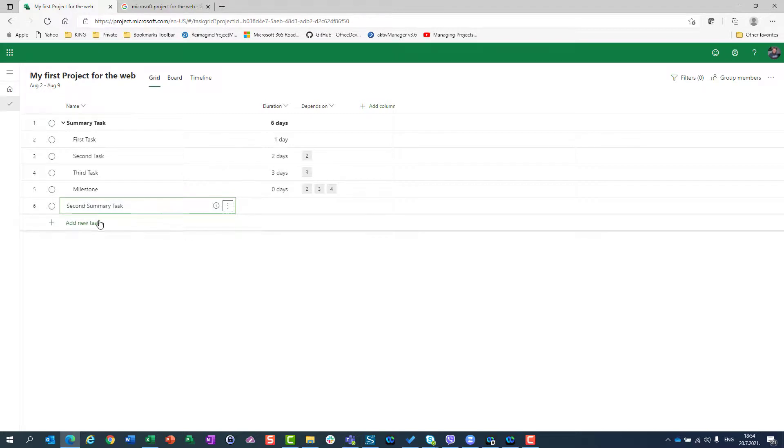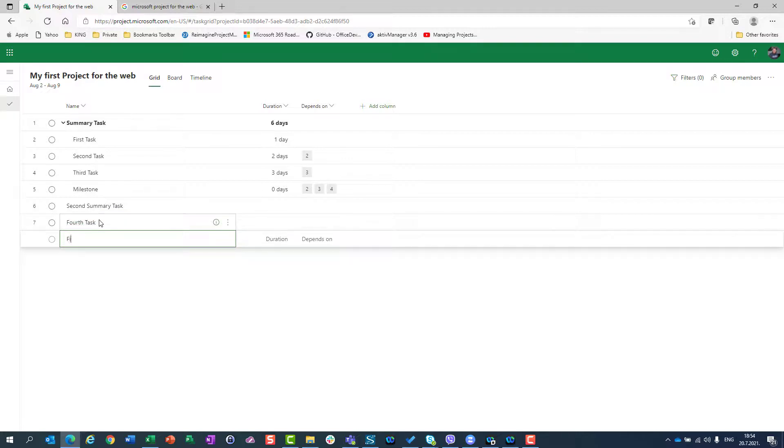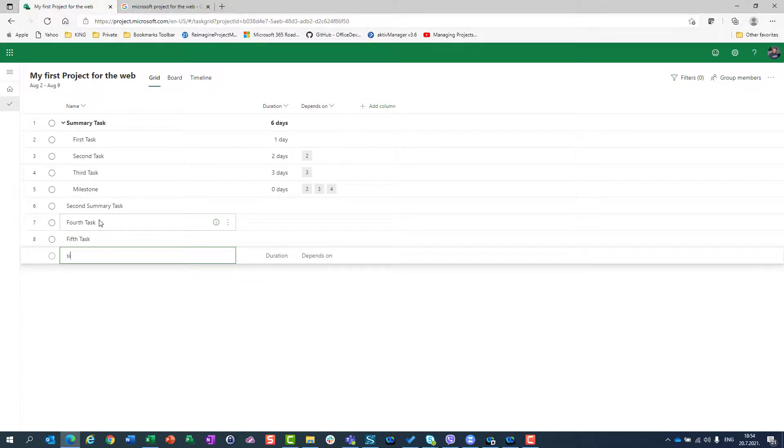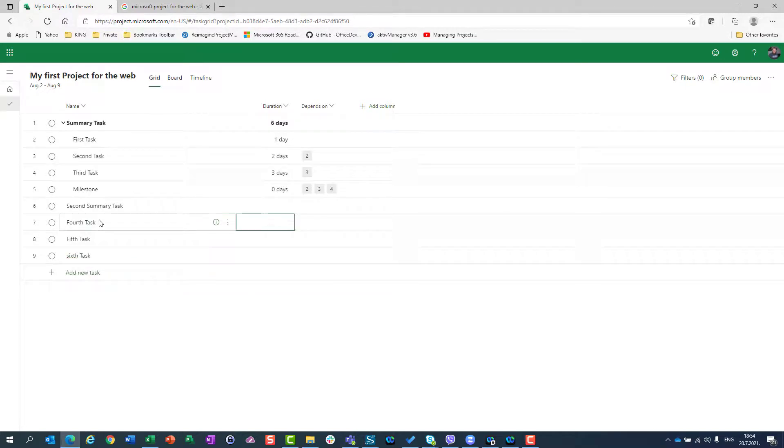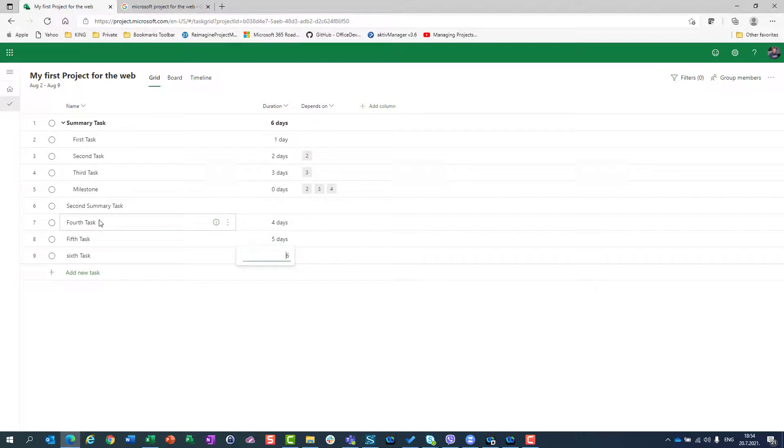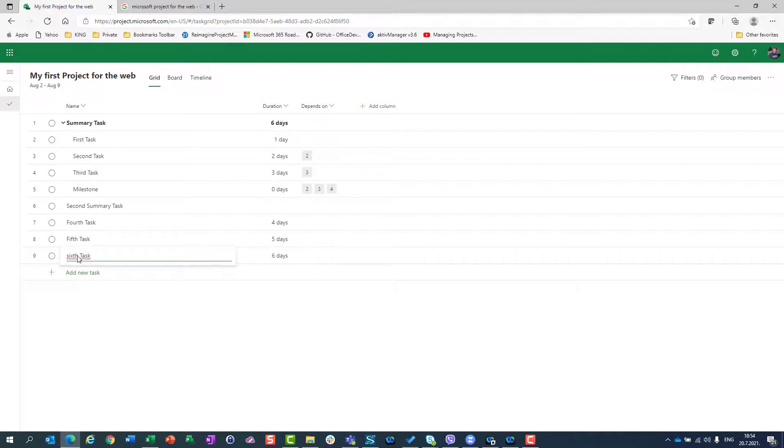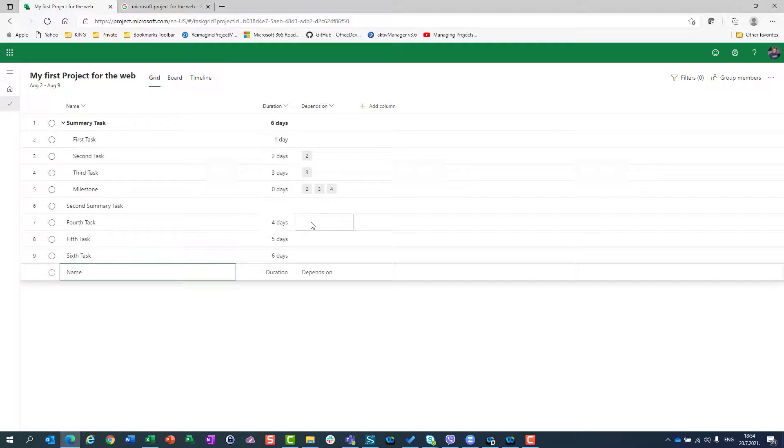So, I have second summary task. Now, I can say that I have fourth task, fifth task, sixth task. I will say here that this is duration four, five, six. I can remember to see I need a capital letter here. So, sixth task. I will connect them.